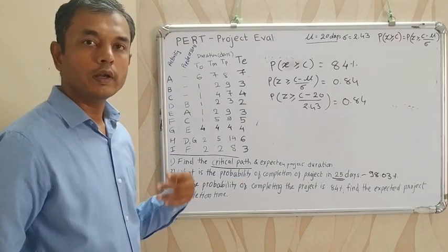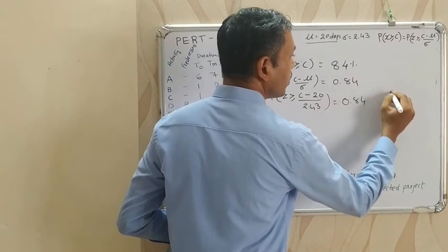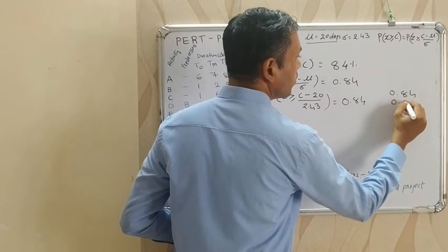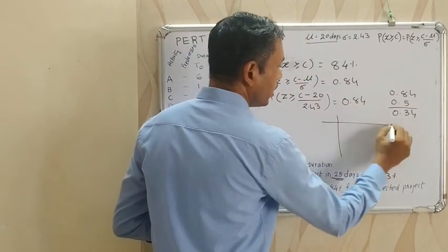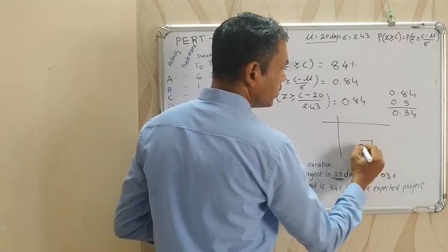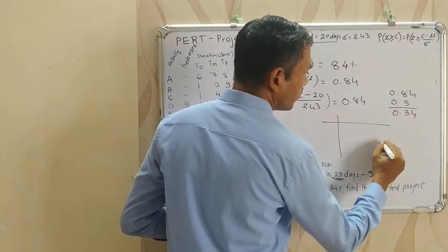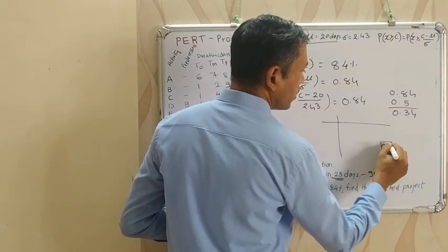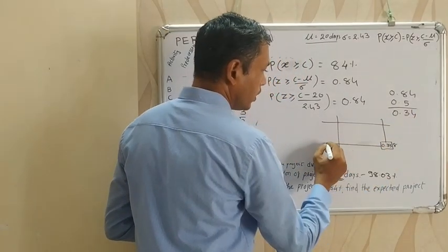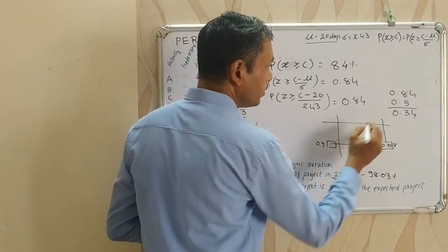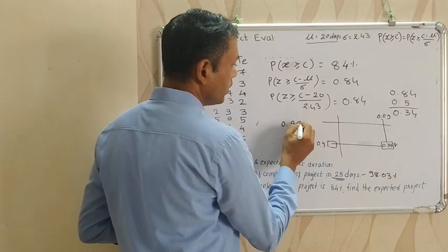Now check this value in the standard normal distribution table. For that, first we subtract the half part of the table, that is 0.5. So we will now check for the 0.34 value. In the table, if somewhere there is a value 0.338, let's take it somewhere here, 0.338. So it is near to 0.34. Take these two values, it is 0.9 and 0.09. So the value is 0.99.